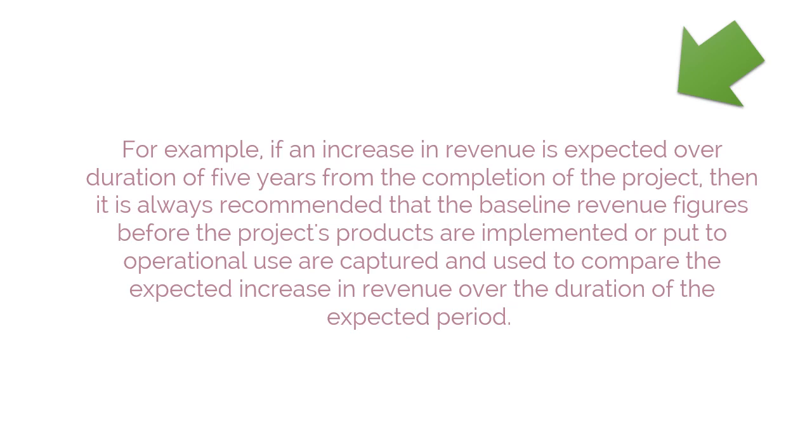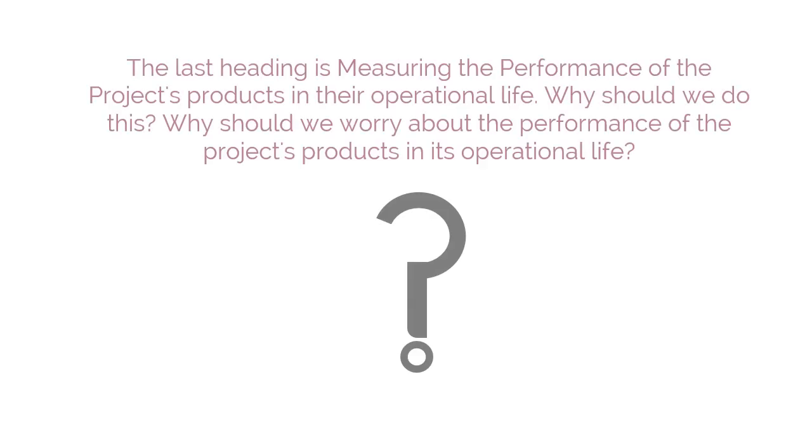For example, if an increase in revenue is expected over a duration of 5 years from the completion of the project, then it is always recommended that the baseline revenue figures, before the project's products are implemented or put into operational use, are captured and used to compare the expected increase in revenue over the duration of the expected period.